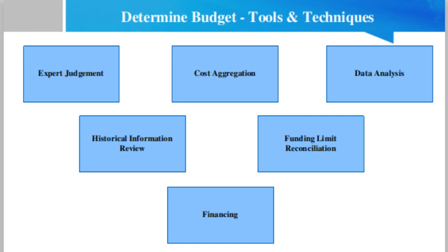Then data analysis. Data analysis is basically a technique that can be used in the Determine Budget process, including but not limited to reserve analysis, which can establish the management reserve for the project. Management reserves are an amount of the project budget withheld for management control purposes and are reserved for unforeseen work that is within the scope of the project.